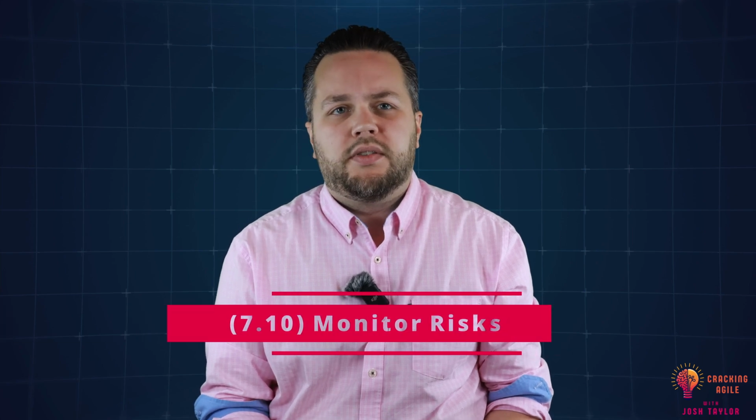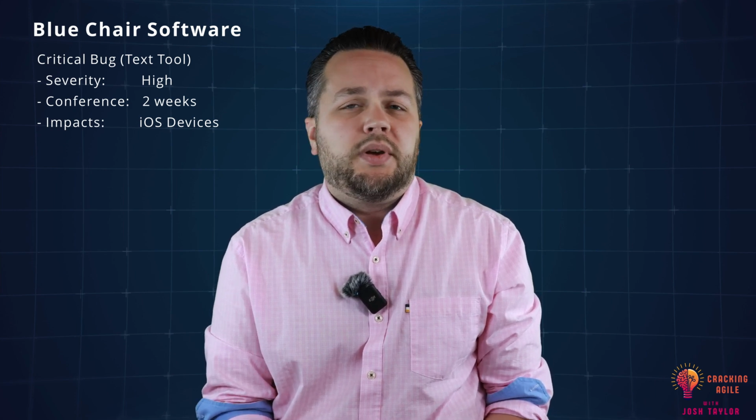Like we've discussed earlier, wherever there is conversation, you will hear about potential risks. You'll need to keep your head on a swivel so you're able to monitor those risks. Again, this is a fluid process, so you'll need to chat with folks and make sure that risks haven't changed in probability or impact since the first time you discovered them. Let's consider the text tool bug example we keep going back to for a moment. What if we discovered that that issue only occurs with iOS devices? The Android build does not experience any issues with the text tool. Because we've isolated that behavior down between iOS and Android, the critical bug may not be as critical as we initially thought ahead of that conference.